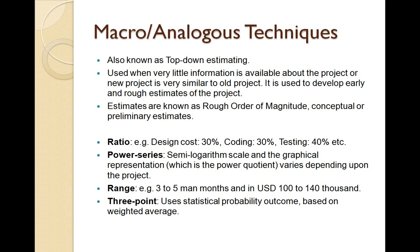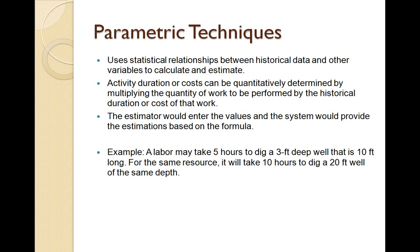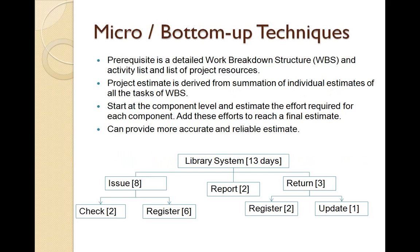The next category is parametric technique, which uses statistical relationships between historical data and other variables to derive estimates. It quantitatively determines activity duration and cost by multiplying the quantity of work by historical cost and duration. For example, if a laborer takes 5 hours to dig a 3-foot-deep, 10-foot-long well, and now must dig a 20-foot-deep well with the same parameters unchanged, the estimate doubles to 10 hours. This proportional comparison allows parametric techniques to project approximate estimates.